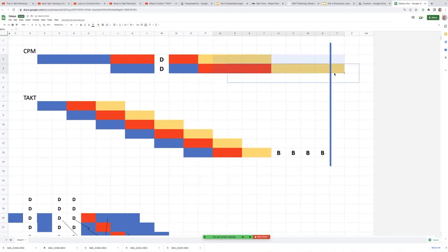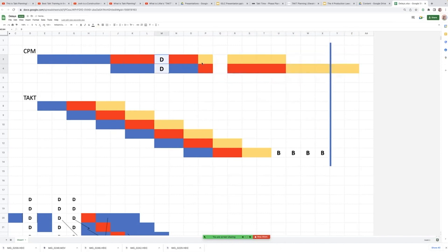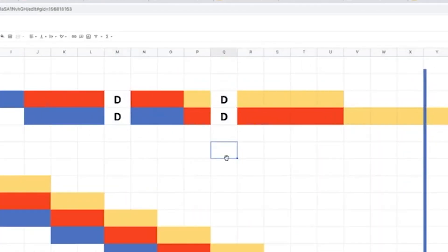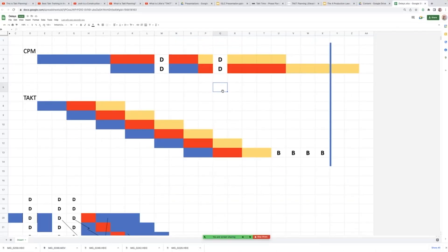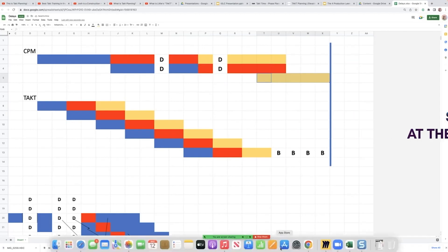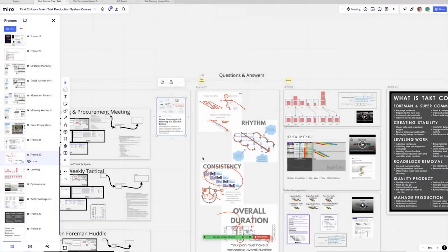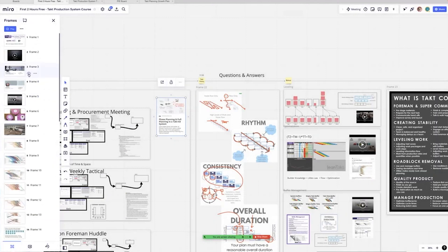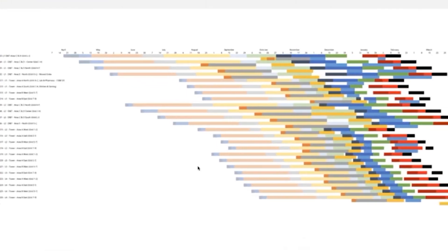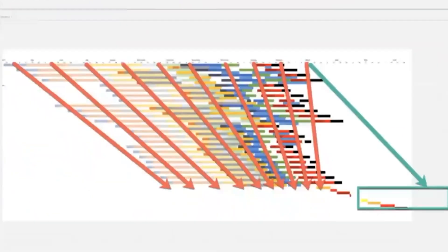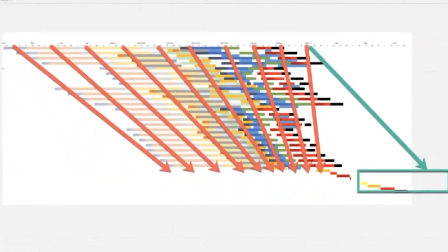You're behind. Maybe that's okay. The owner's not too upset. Well, there's another delay. What are we going to do now? What do people start to do when this happens? Just think about it. You don't even have to answer it. What do people start to do? Superintendents, schedulers, and PMs will start to stack the logic at the end of the schedule. And why is that a problem, ladies and gentlemen? If you start to stack, and that's the exact reason that this schedule started to stack, that is a lie.